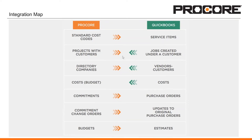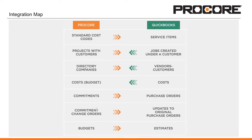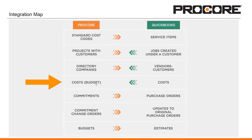The next piece is really the workhorse of the integration. You can create your commitments, subcontracts, and purchase orders in Procore and then sync those over to QuickBooks as purchase orders. You can also create your commitment change orders in Procore and sync those into QuickBooks, and it updates to the original PO. You can also create your budgets in Procore and sync those over to QuickBooks as an estimate. What's really nice is being able to push costs from your accounting system seamlessly into your Procore budget via the integration, with an extra column inside Procore's budget tool showing your job-to-date costs or actuals flowing in directly from QuickBooks.